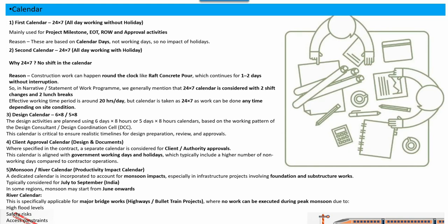If you have not taken it, the engineer will say that you have not considered the river calendar, and the impact will not be counted in the extension of time. That's why this type of calendar is very important. Now I will show you the creation of the same calendar in our Primavera.